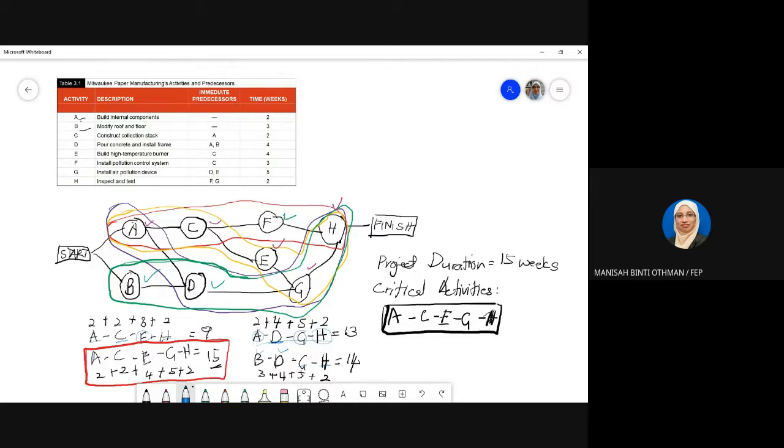Unless, let's say after A is complete in 3 weeks, you realize, oh, we already delayed the critical activity, then you have to replan the rest of the critical activities. It means that maybe C, we have to make it complete in less than 3 weeks. Then that's where another method comes in, which is not covered in this course. We have to calculate how to finish each activity in less than the duration that you planned.